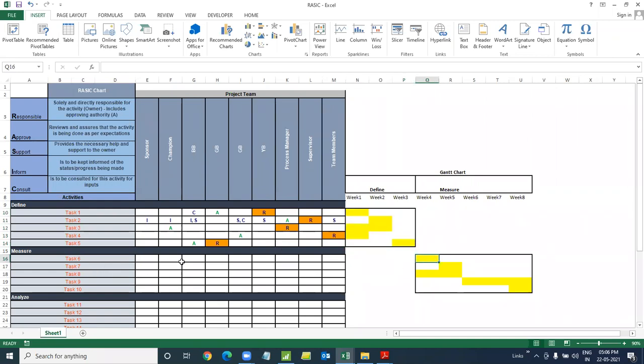How long will this task 7 take? Well, when it's completed, I can start. It will take 1 week. Okay. Well, how long will this 8 start? No, 8 can start initially also. So we can start. It will take about 2 weeks. So by this time, this is getting over. This task number 9 can only be completed when these 2 are completed. So we start after that. It takes me 3 weeks time.